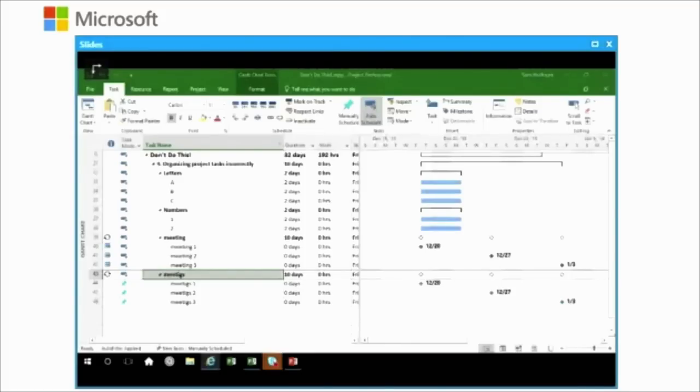Sud says, what was the second calendar after the project calendar, please? Okay, you can have four different types of calendars. There's a project calendar, which is a base calendar. This one is for the project. You can have any other base calendar that's generally used for resourcing, or it can be used for task calendars as well. So this would be a base calendar that isn't used for the project. It's used for resources, used for other tasks.